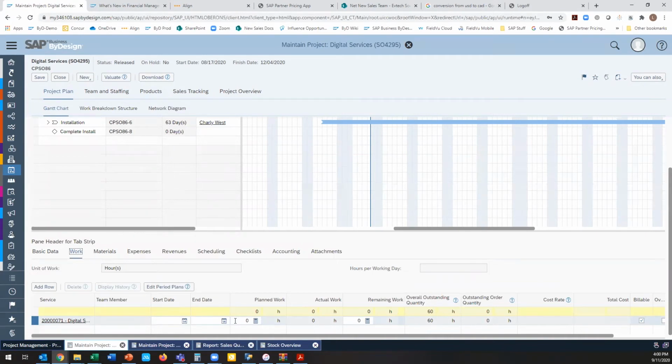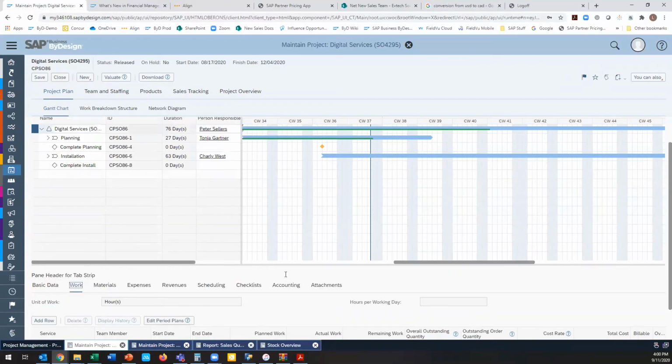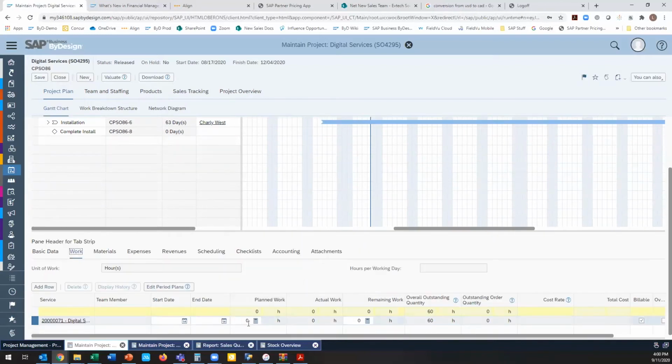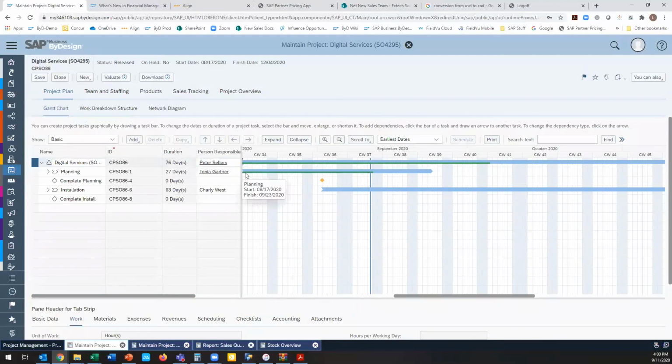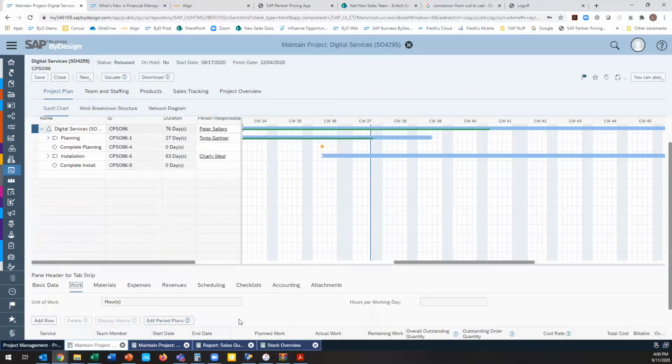So it gives you a much better, more detailed representation of when you're going to be needing the resource. And now you can actually get down to essentially day level planning from an availability standpoint. So we get a lot better results on our resource management, our resource searches. So if I did have, as an example, someone that was working on this project for 40 hours over the course of the project task that was going for a month and a half, but I only needed them for the first week, you would now see that front loaded in the first part of the project.